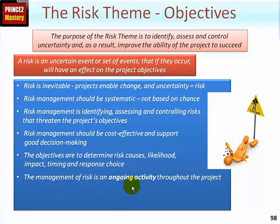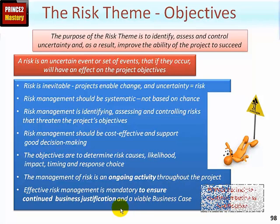Prince2 has several responses for either negative threats or positive opportunities. The management of risk is an ongoing activity throughout the project — risk identification should not just occur at the beginning. Throughout the life of the project, risks may change: they may become more or less likely, or their impacts may differ. New risks will also arise, and part of risk management is implementing responses and ensuring they have the desired effect. Effective risk management is mandatory, linked to the Prince2 principle of continued business justification.